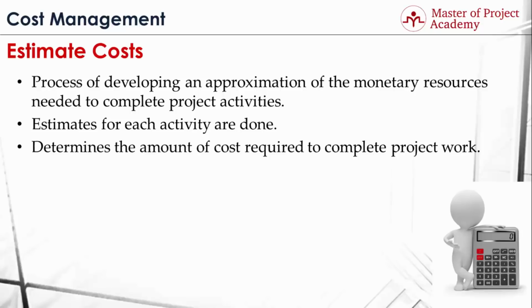For instance, let's consider that you are managing a construction project, and one of the project activities is painting a room of the building. Let's assume that the painting will be completed in 1 day, and 2 painters will work. When estimating costs for this project activity, you need to consider the costs of the painters, such as wages, insurance policies, clothes, etc., and the material they will be using, such as brushes and dye, etc. Costs of other project activities are estimated, and a total project budget is determined at the end of this process.